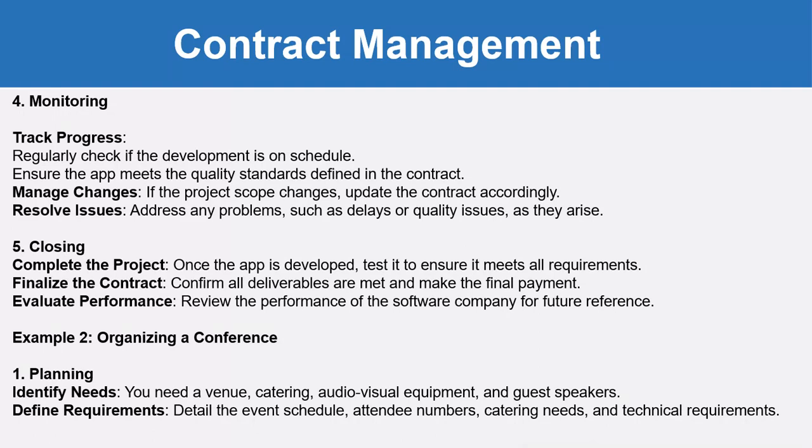Then the closing means that once the app is developed, test it to ensure it meets all requirements, confirm that all deliverables are met, make the final payment to the vendor, and review the performance of the software company for future reference as well.